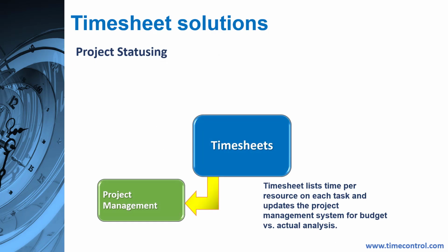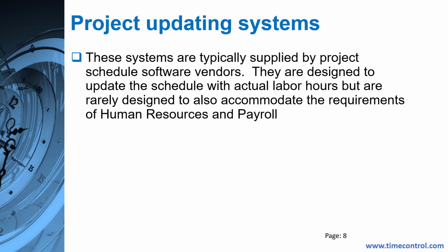The work that we started here at HMS started around project management and project statusing systems. So again, a very particular kind of requirement. Here we start from a planned bit of work to say, well, this was the plan for the work. Now we'd like you to update that plan with how much time did you spend on it, and how much time is left, either as an amount of time or as a percentage of completion. And so these systems are often provided by the project management system vendors. Like a Microsoft Project Online has a timesheet, so you can update the tasks in Microsoft Project.